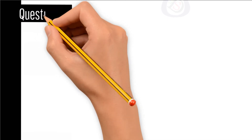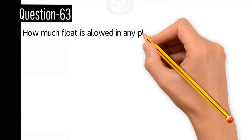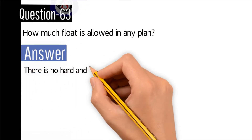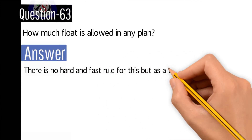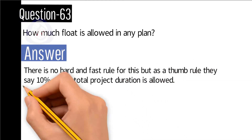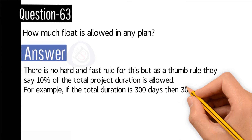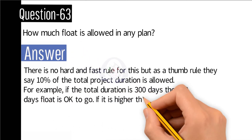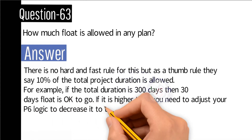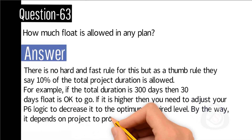Question number 63: How much float is allowable in any plan? Answer: There is no hard and fast rule, but as a thumb rule, 10% of the total project duration is considered allowable. For example, if the total duration is 300 days, then 30 days of float is acceptable. If it is higher, you need to adjust your P6 logic to bring it to the optimum level. It depends on the project.